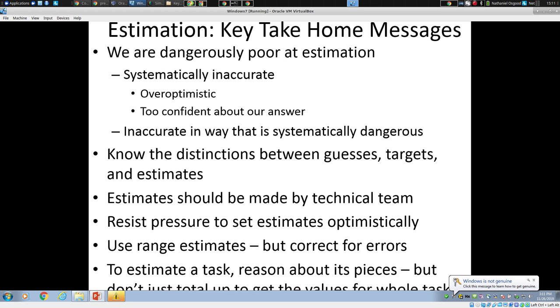By contrast, if you decompose the task logically into its different constituent parts, you make an effort to ask, let's see, we've got to do this and this, we've got each of these four types of markers to have, we need a way of importing data and perhaps some way of selecting the axes. We need to be able to select which date column to use and what date format. We've got to implement this for real numbers as well as calendar dates. Once you start thinking about specifics, we can often get much better at estimates.